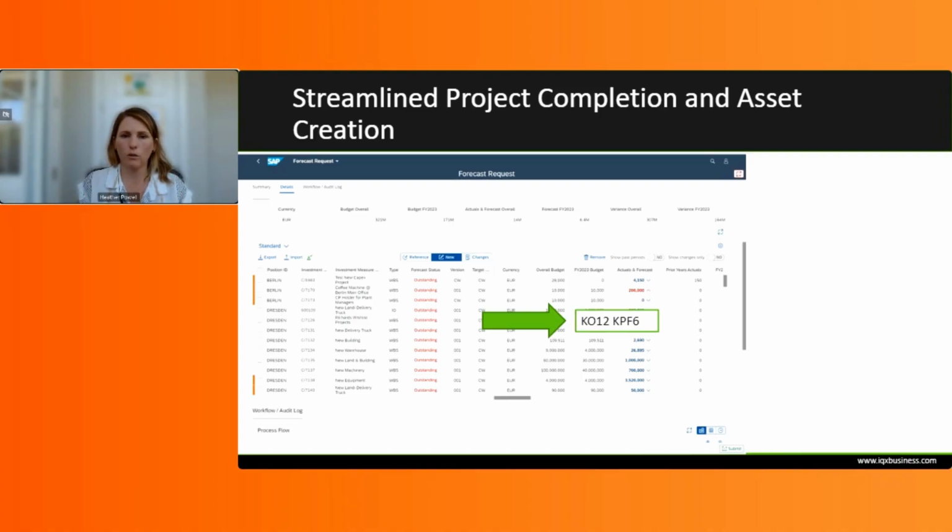If one project had overruns and needed to borrow from another project, we're able to use that budget transfer process within that application. It would then also go through approvals, so that the correct people are approving that transfer of budget before the integration would occur and move that budget from one project to the next. With the same occurring, where you would have that seamless integration and the SAP transaction codes running in the background without any manual intervention needed.